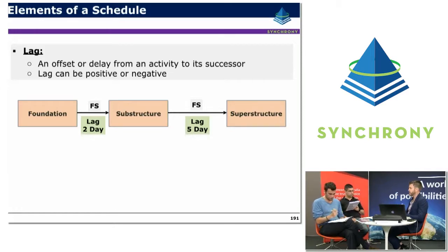But sometimes if the activity is fairly trivial or it's a fairly high level schedule, there's not such a high requirement on that. But particularly where you're close to the critical path or there's a need to have a very thorough understanding of exactly what's happening along the critical path, the lag should be broken out into an actual activity. So in this case, it should be broken out into a 2-day activity, for example.